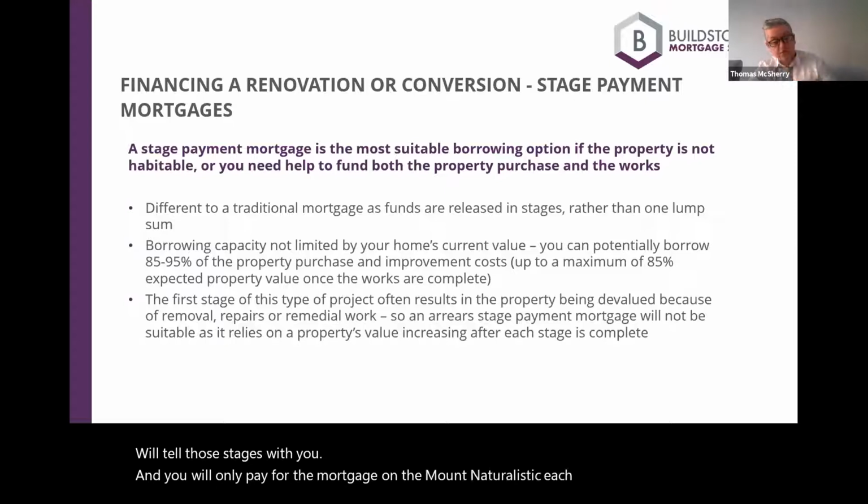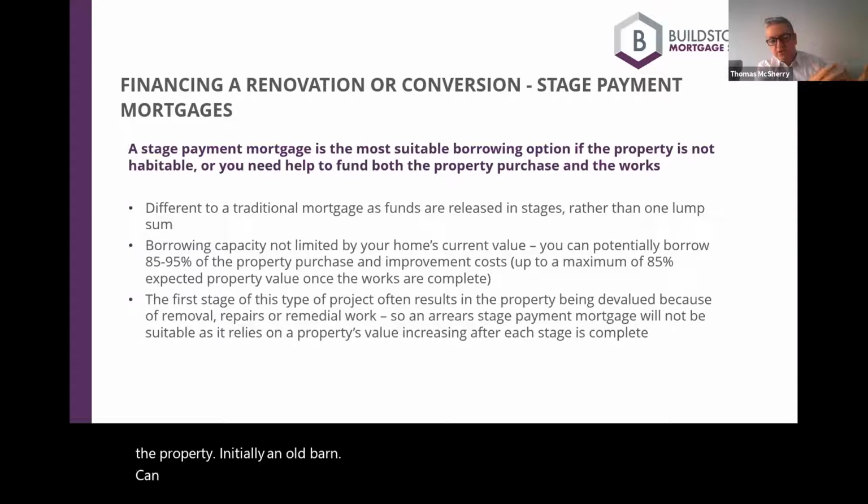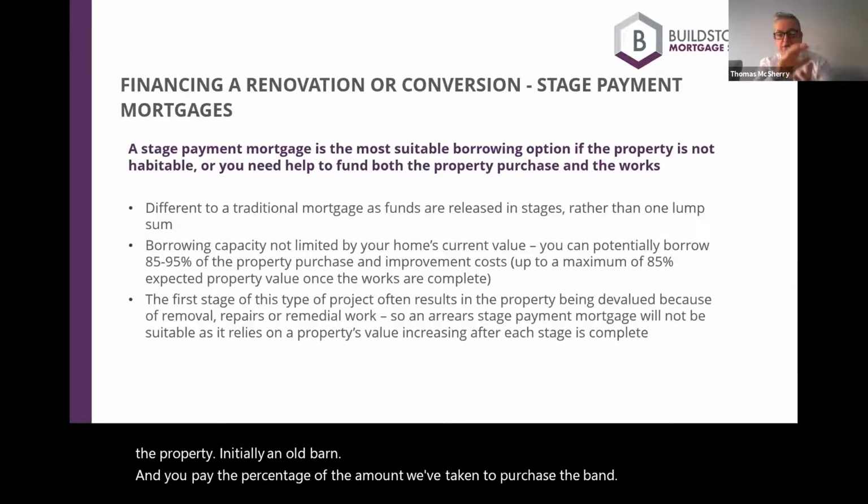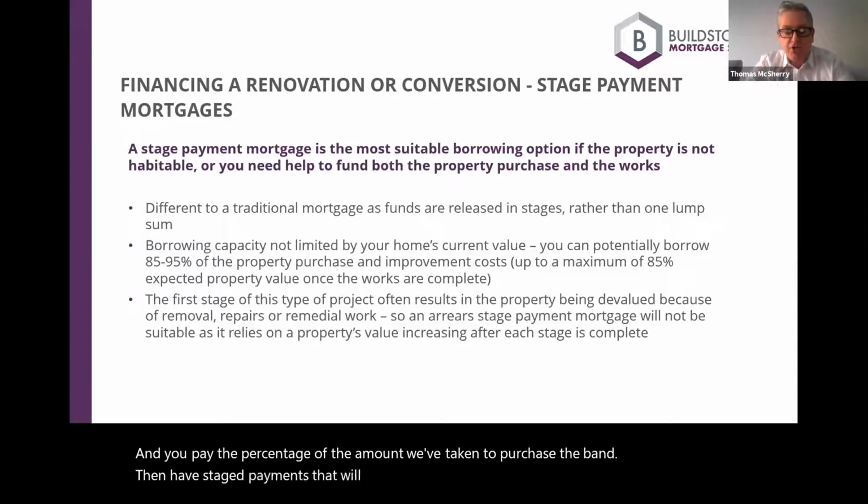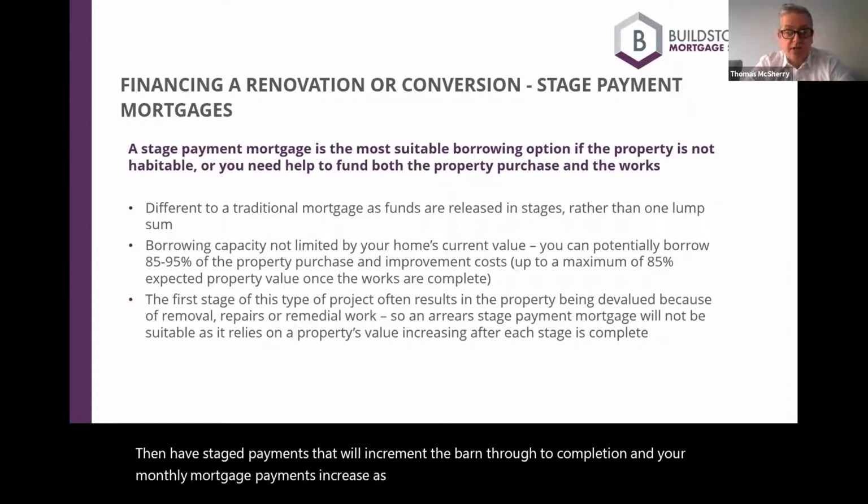If that is to secure the property initially, an old barn, you'll pay the amount that you've taken to purchase the barn. We'll then have stage payments that will increment the barn through to completion, and your monthly mortgage payments increase as you take funds progressing the build through to completion.